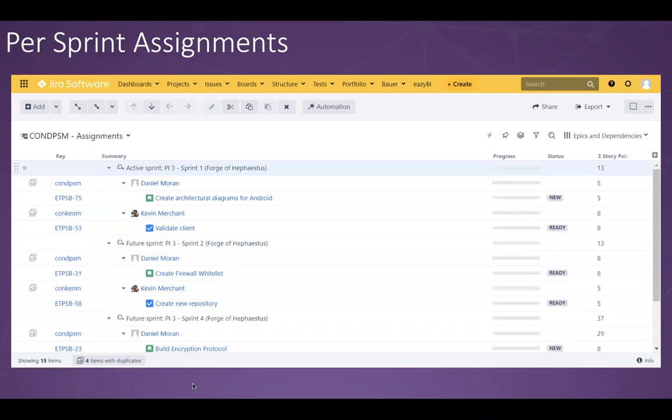Another thing those same people asked, and I alluded to it a moment ago, is that a lot of managers want to make sure their people aren't over allocated. One of the Agile principles is that teams are sustainable. They can keep doing their work indefinitely without being overworked. And we also don't want people under allocated. Now, depending on the paradigm you use, team members may volunteer to do items in sprint planning, so they know what they're going to do this sprint, rather than the more traditional agile paradigm where you pick up items from the to-do column as the sprint's underway, which was fine.